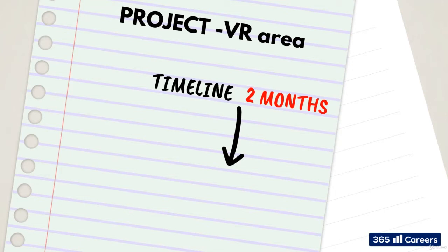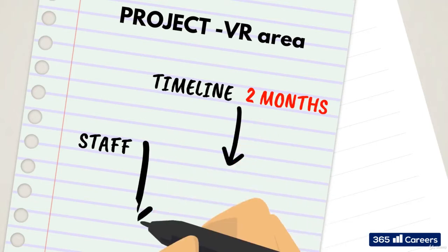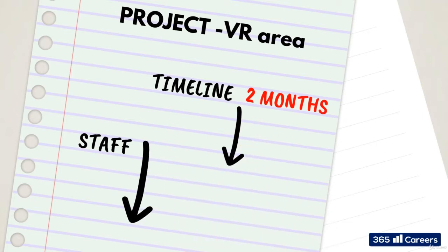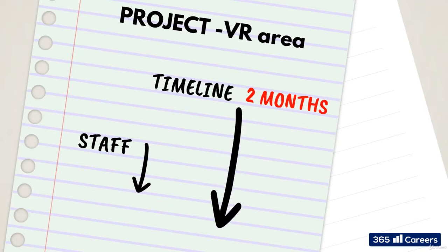A little while later, you start planning your resources and you realize that 2 members of the tech team have left since last year, leaving you with 20% less staff. There's a good chance this will affect your timelines and you will have to go back and revise them, adjusting the time and resources of the project. See? Planning is iterative. Be patient, and until all areas have been analysed and planned, you better write your plans in pencil.